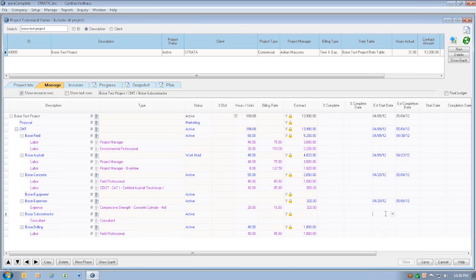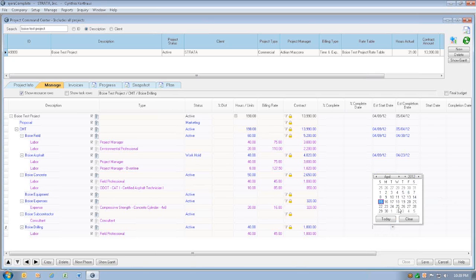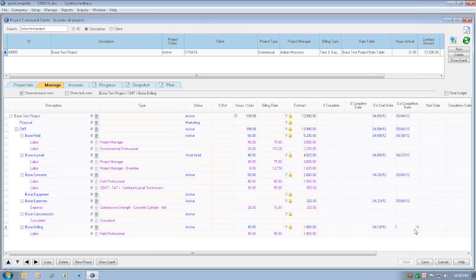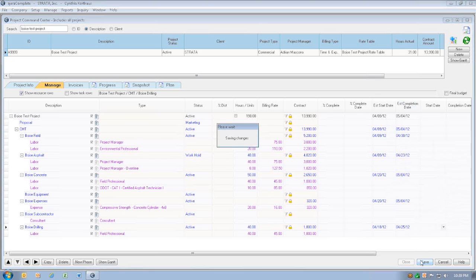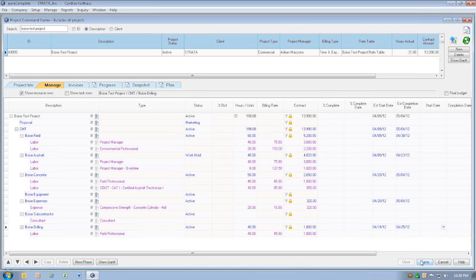Subcontractor, we don't have any subcontractors, but the drilling, we're going to start on Wednesday, and it's going to last about a week. So now that we have all of those phase dates in here, we can save this.